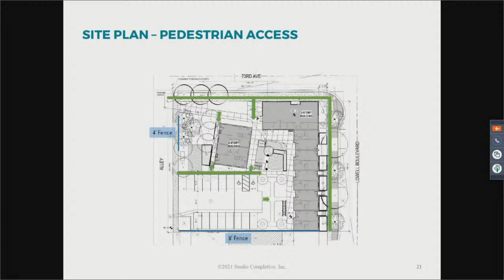Hey, Dino, it's Molly Taylor jumping in. Hi, Molly. I covered this, I think, as you were signing on. And so welcome, and let me go back. The environmental cleanup has been contracted. We are in the process of finalizing a contract with the group that will perform the asbestos abatement and the demolition. Right now, they will work through May and June to get that work performed and get the buildings down.